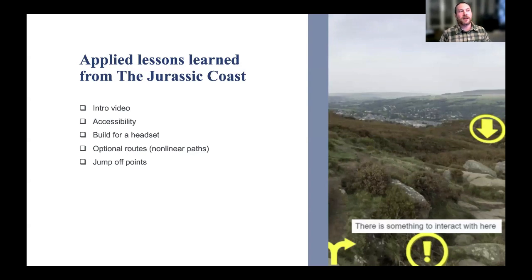This was the second trip. There were quite a few lessons learned from the first one that I tried to implement from the beginning when working on this one. And a big one was having an intro video at the start of the resource, just to explain the resource to the students, how they're expected to use it, and a bit of technical things and what to look out for. Tried to add some more accessibility to this project.